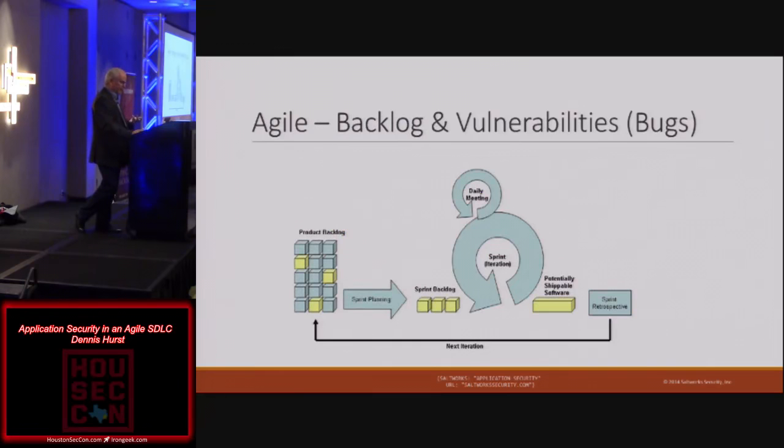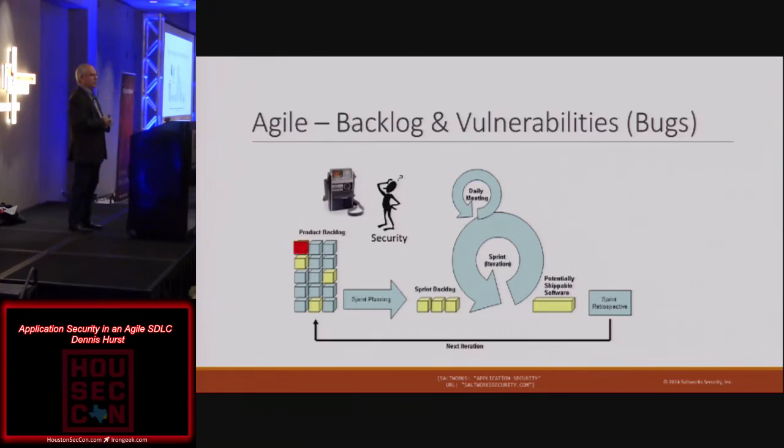The way that we do that, and this is what a lot of times looks like, is you have your backlog, which is just a list of things. We want to take the technologies, the methodologies, the activities that we want developers to do, and we put them in the backlog. A lot of times, depending on how you're implementing Agile, those are called user stories. A user story is simply a thing you want done. And you'll see these phrases that will say, as Billy, I want a swing that I can swing on. And that format of as, whatever the person's name is, what do you want? It's not a design, it's a statement of desire. I want this thing. Why do I want this thing?